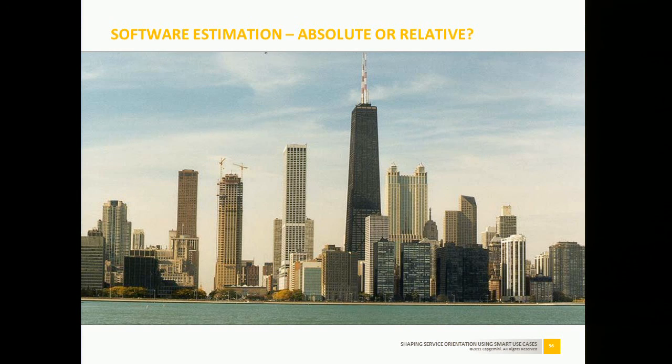So it's much better to do it at a relative scale. Suppose this black building, let's call it a 5. I'm creating a scale from 1 to 5. You can create any arbitrary scale, of course. We've created one for the smart use cases anyway, but suppose I've got a scale from 1 to 5, and I call this building 5. How high would this building be? 4.